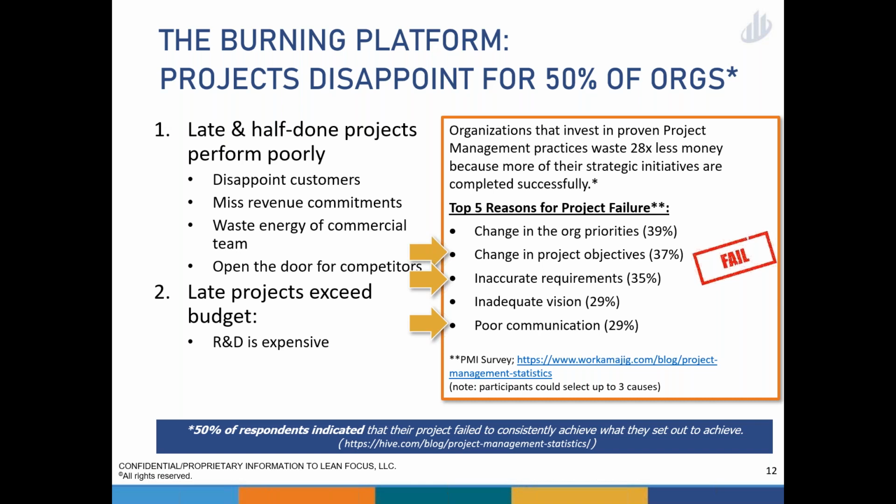That's what we do when we put half-baked projects into development. We go ahead, make the commitment, say we're going to do it, we're going to work it out later, and then once you find out there's problems, they are so hard to correct. For example, we need twice as many resources as we thought we needed now that we planned it carefully. And the boss is like, I don't have twice as many resources to give you. Now what? And so you wind up with problems that really just can't be solved or can't be solved in any kind of reasonable way, or maybe they're solved, but at the expense of other important things.